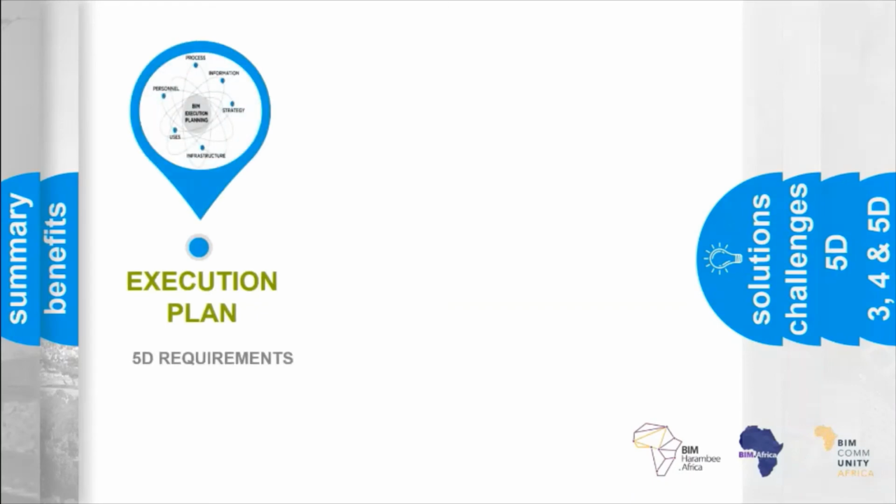The document effectively covers three main sections and has three main premises. The first being the involvement of the BIM execution plan. And while the BIM execution plan is intended as a tool for managing project information, it invariably becomes a design-oriented document. The quantity surveyor must ensure that frameworks agreed to in the BIM execution plan provide for the information to be communicated in a manner that is 5D friendly.